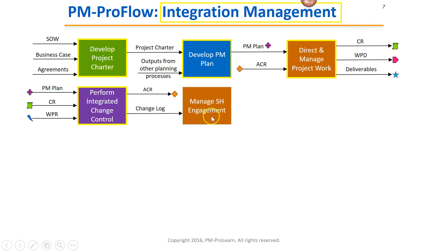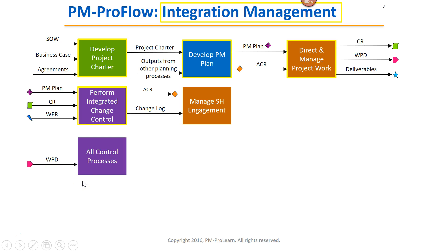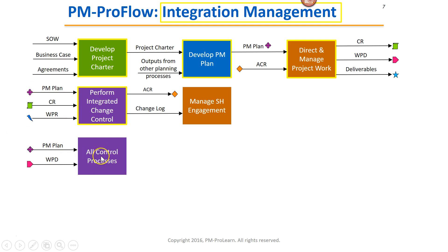So we're taking things out of Integration into Stakeholder Management. Work Performance Data — the next output of Direct and Manage Project Work — goes into all control processes. There are eight control processes in Table 3, TAC 1 of the PMBOK, such as Control Quality, Control Risk, Control Scope, and Control Schedule. Any process that starts with the word 'control' is represented by one purple box, and all monitoring and controlling processes use work performance data. They also use the PM plan, and the on-page connector shows it's an input to both Perform Integrated Change Control and all eight control processes.